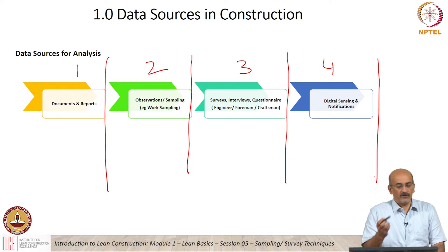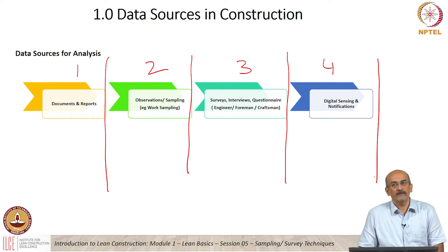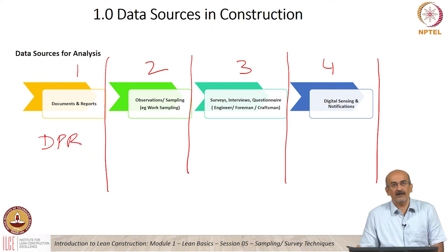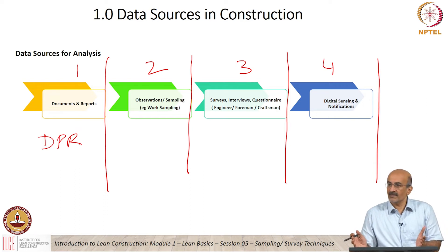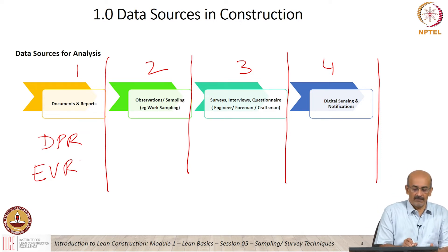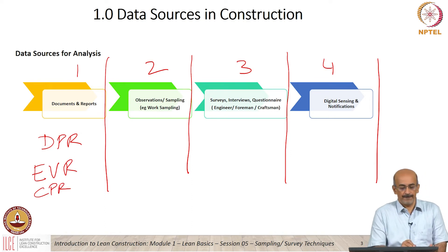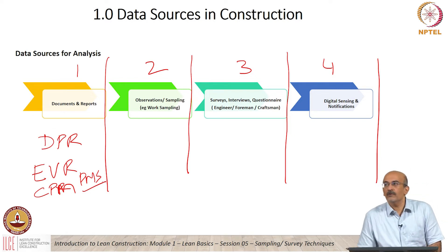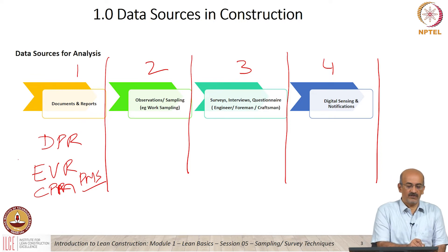If I take documents and reports — can someone give me an example of what is typically a document or report from a construction site? A daily progress report is a document or report which is actually documented on the site, and from a DPR I can get data to analyze what is happening on a daily basis. My earned value report, my critical path method reports — all of these are documents and reports. The productivity measurement systems are also a documented way to assess productivity and take control. These are approaches which we are all familiar with.